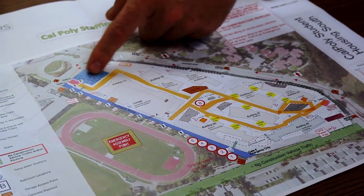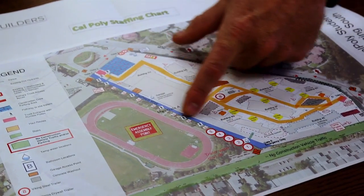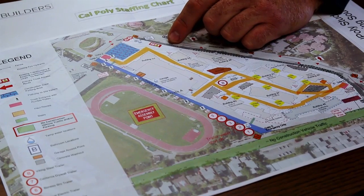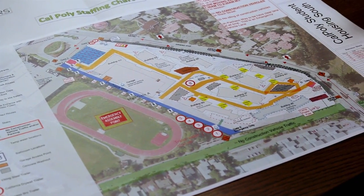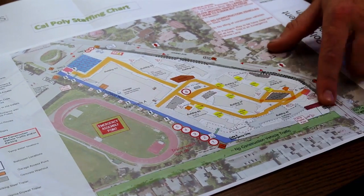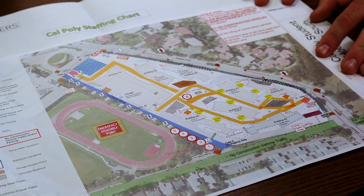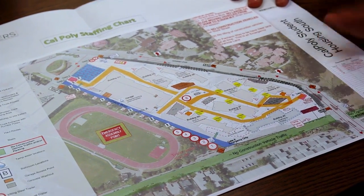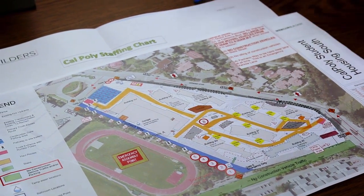You also show how pedestrians can get from your site to their trailers. We have a pedestrian walk path along Pacheco. You have haul routes, and you point out no-construction areas. When you talk with subcontractors, you say, Slack Street is in our contract, we cannot park there. There's a school over here and they don't want any interruptions. When we sit down with all the trades, that's something we go through. This thing evolves. It's a living, breathing document.